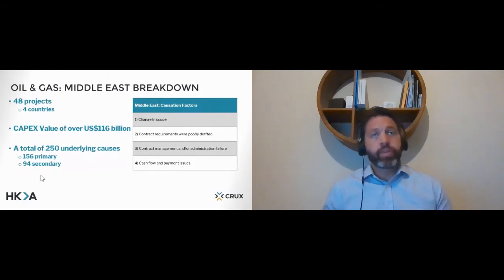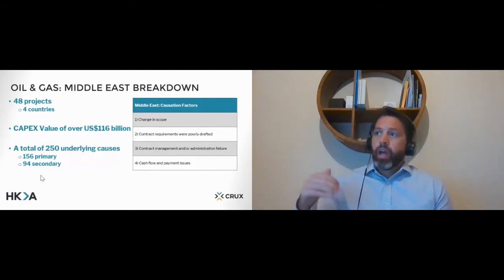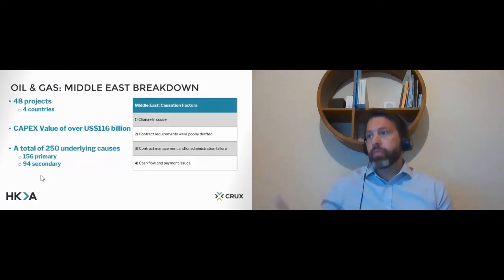So if, for example, you are an organization that is maybe coming to the Middle East market, and maybe you're not going to a specific country, maybe you're going across the region, based on the data that we've got, the typical issues that you're going to come up, again, we've got change of scope number 1, but the contract requirements were poorly drafted, contract management or administration failure, and cash flow and payment issues.